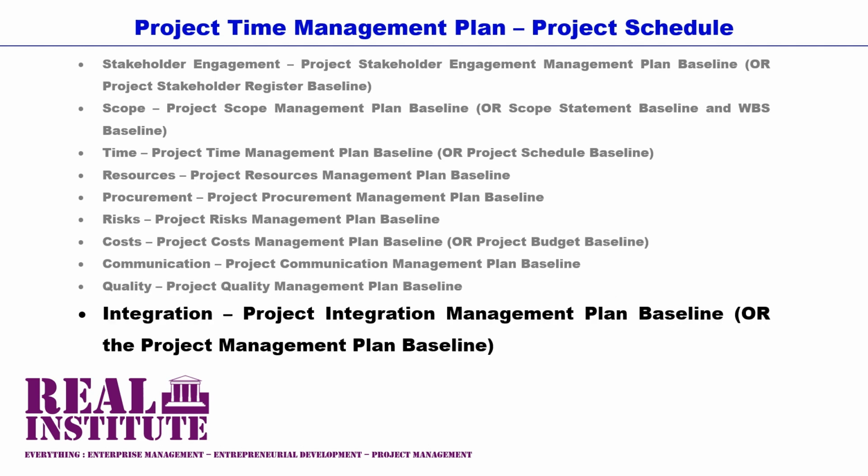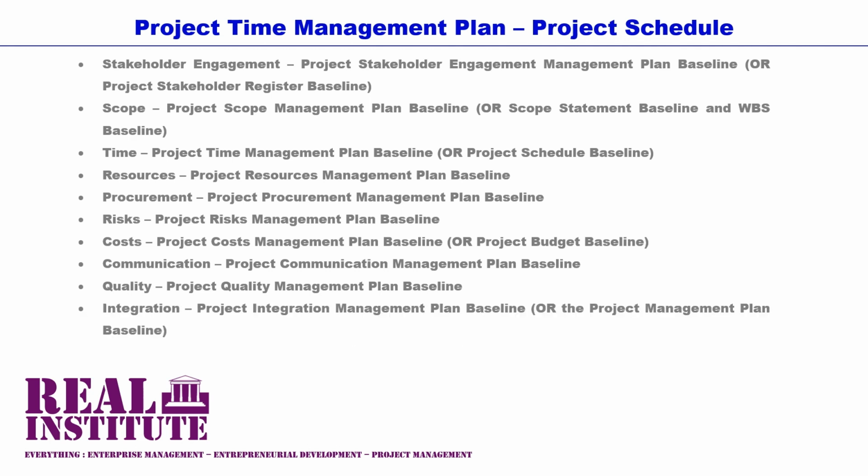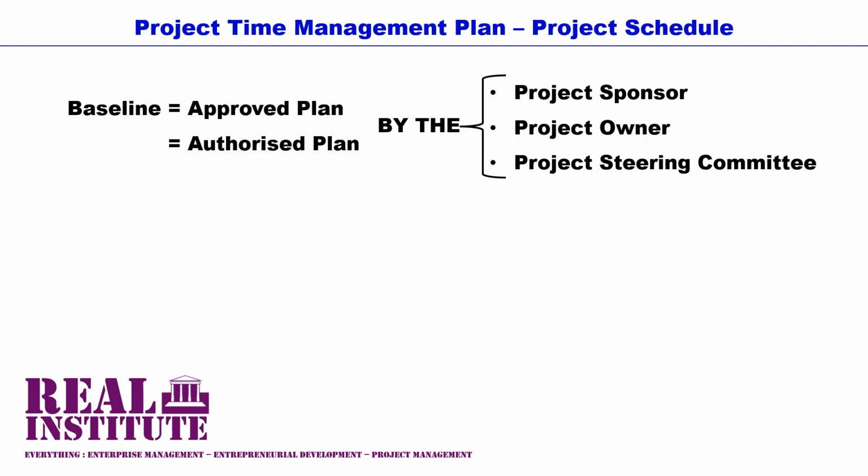And integration has its own baseline, which is the Project Integration Management Plan baseline, which is simply the Project Management Plan baseline, as it is the consolidation of the other 9 subsidiary Project Management Plan baselines. All these plans in project management are referred to as baselines only if and when they have been approved or authorized by the project sponsor and by the Project Governance Forum, a forum that is also referred to as the Project Steering Committee.